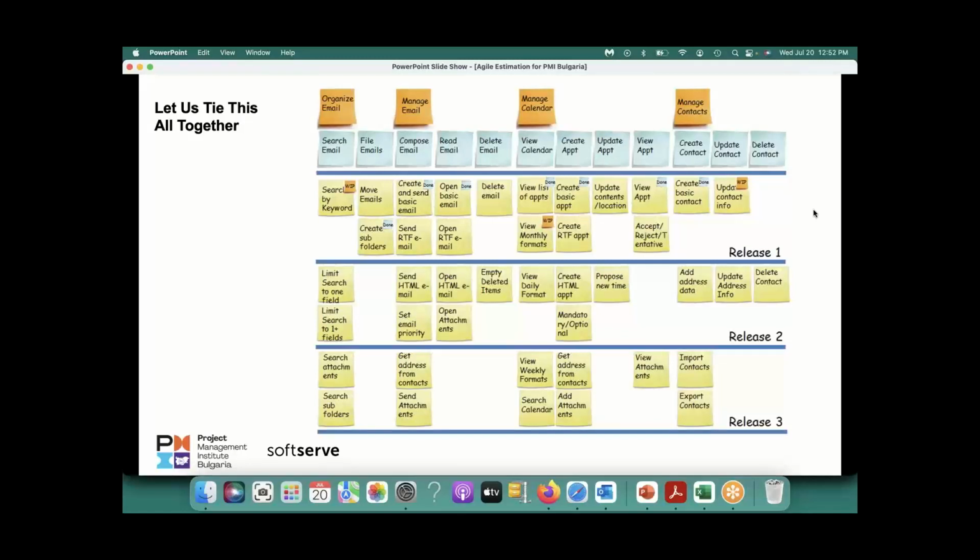Great. Since you already groomed stories worth two sprints, and that's why I was telling you the best practice is to groom stories worth two sprints. When you started the two weeks, you already passed one week, so you might have groomed for one more sprint. Take from the backlog and keep moving. Whatever you can do, that's wonderful. But two weeks doesn't shrink. Two weeks stays two weeks.